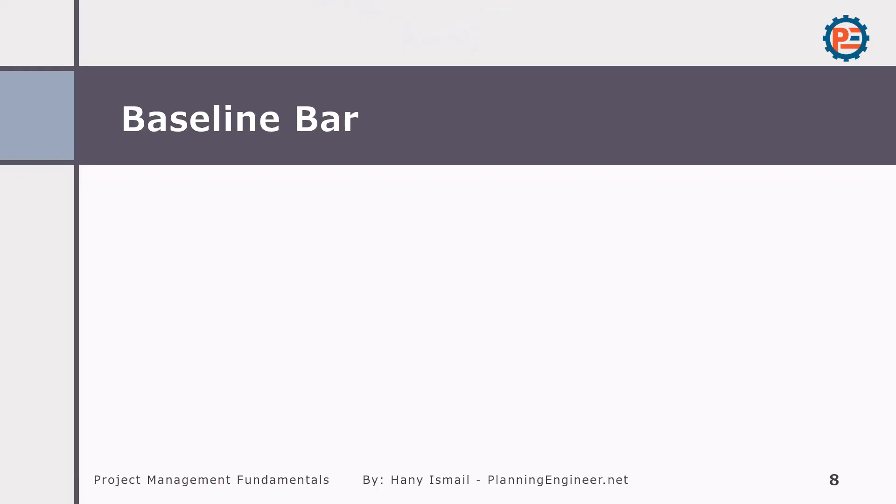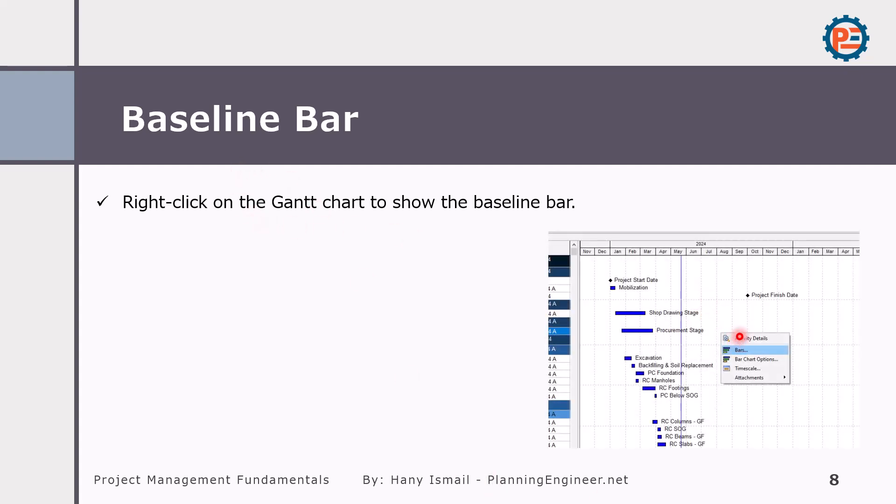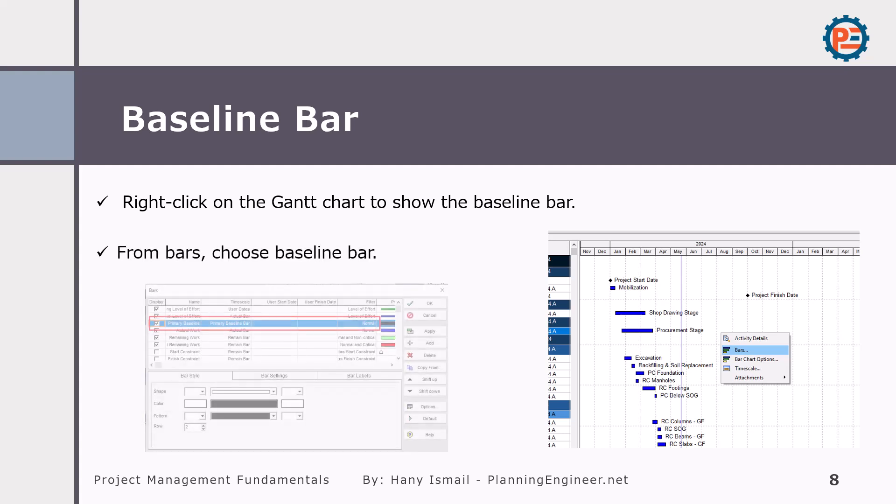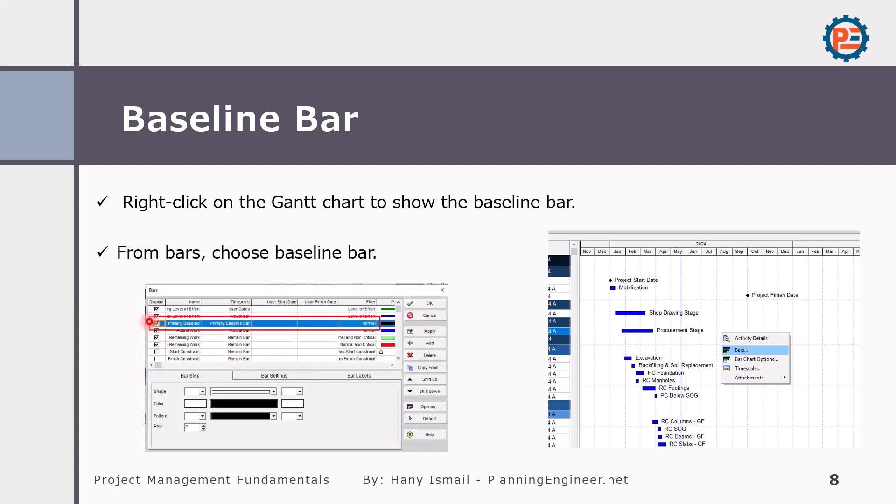Simply right-click on the Gantt chart area here, just right-click and select bars. From bars it shows the baseline bar. You will find here primary baseline - you can choose it and select the color for it.